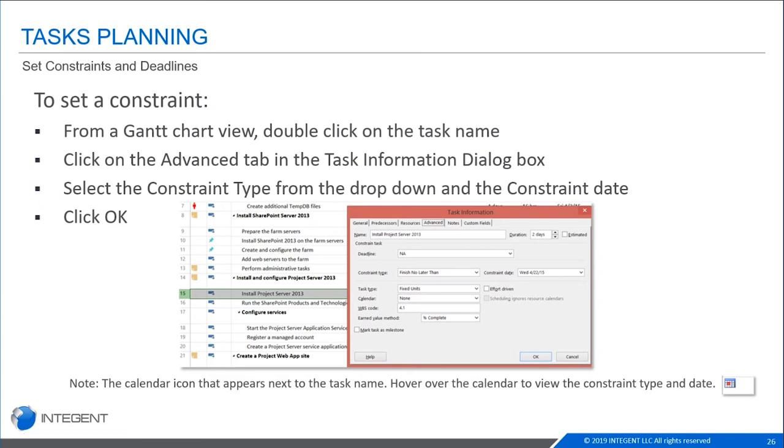And I'm going to repeat, because I think it's very important, that it is important to avoid musts by typing in the start and finish dates unless you absolutely need to do that.